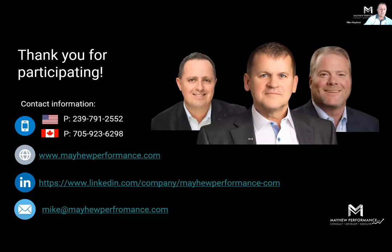What that means is there's a major cost. What I'm trying to say is that there was a reduction by going with battery electric vehicles. We decreased the size of ventilation, we decreased the size of headings, and we also decreased the size of the equipment, which was a big win. The impact on NPV, net present value, or net present cost, was drastic, and it made the economics make sense. It doesn't happen in all cases, but it happened specifically in one of my projects that I just finished.